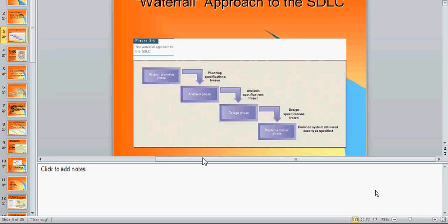That is called staffing the project. In that, we go and meet the managers of different departments and explain to them who we will need as a team in the project, and the managers will then accordingly assign the right members to us.